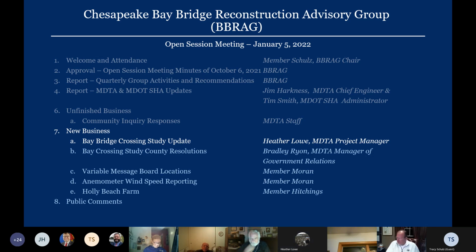On December 21st, we uploaded the preferred corridor alternative package to the study website, baycrossingstudy.com, and we sent out emails notifying project stakeholders of the new information. As BRAG members, you should have all received an email, and I hope you've had a chance to look at the package. Our next major step for the Tier 1 NEPA study is to complete the combined final environmental impact statement and record of decision, which is the final formal step in the NEPA process. We anticipate it will be completed later this winter. So we are very close to finishing our Tier 1 study.